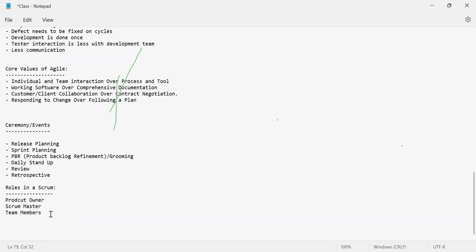What is team capacity? Take, for example, the sprint cycle, which we were discussing, right? Sprint is nothing but the cycle which can span from 1 week to 4 weeks. Say our sprint is a 2-week cycle. Every 2 weeks, you should be able to pick up a story or stories, develop it, test it, and push it to production.